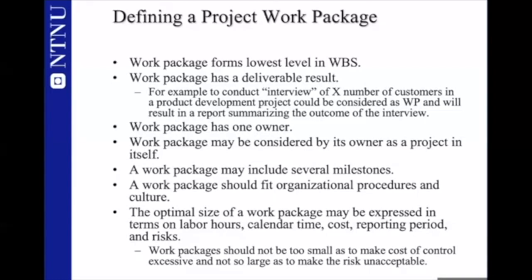Some say it should be roughly between 40 to maybe 80 hours. Some say, well, it could be maximum 200 work hours, which means that if you have one person working on a work package, this person will require between 1 week and 2 weeks to complete this work package. So this is an optimal duration of a work package, 1 week to 2 weeks.